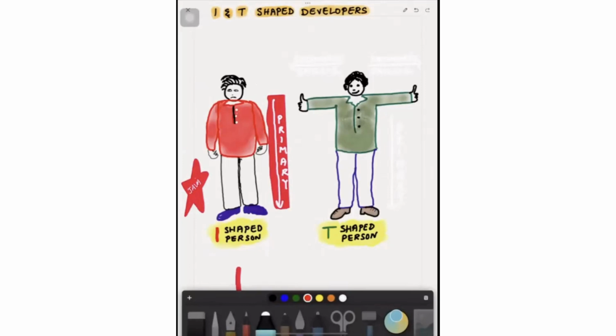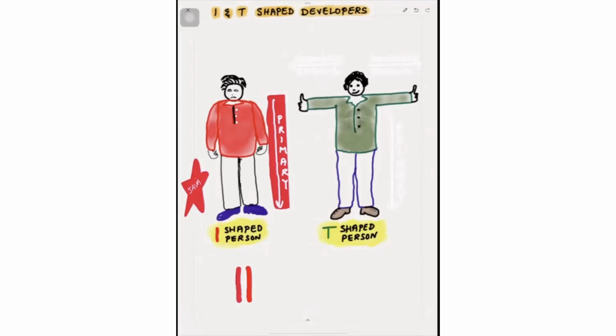So imagine if you have a Java expert, an HTML expert, a UI expert, a database expert, and maybe an automation expert like that in a team. There are some fundamental problems. Number one, if one person is absent in a sprint, because others don't have that skill, they'll be handicapped. That means they're highly dependent on each other. Two, they don't talk to each other because there is no common skill. Three, for example, a database person, if he has only 60 or 70% of database work, what does that person do for the remaining 30 to 40%? Sit idle.